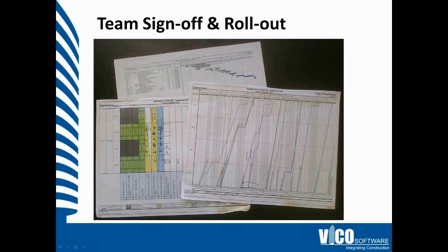we would provide a set of data in all of the different views that we have available from the schedule planner environment. If you want to print out a Gantt chart, you can do that. If you want to use Flowline, you can do that. If you want to have a list of start dates, you can do that as well. And we would provide a packet of the signed off optimized plan to each of the team members as you would in a 3D coordination exercise. Basically, this is manpower coordination in the field, and we provide this as the optimized plan moving forward.